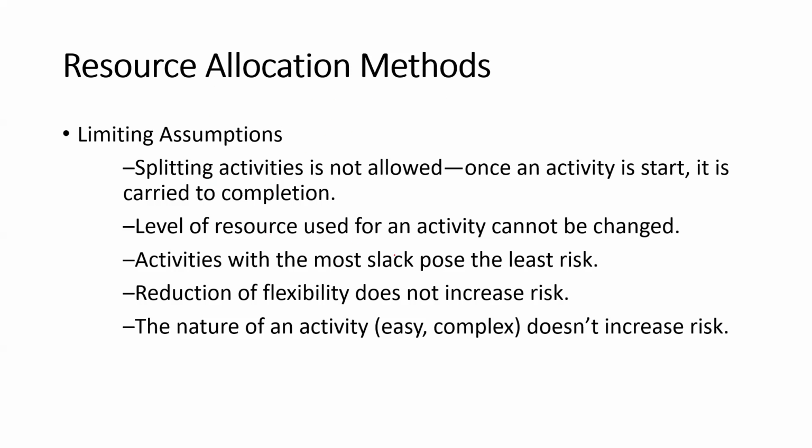The second assumption is that the level of resource used for an activity cannot be changed. In the upcoming example you will see the level of resources needed. That level cannot be changed when we allocate resources; it stays the same. The third assumption is that activities with the most slack pose the least risk.